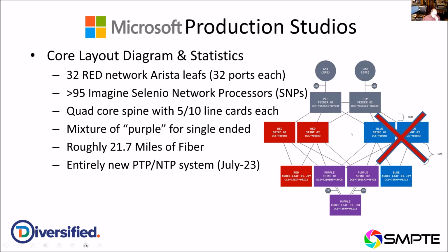Now, the reason for this is quite bold. A lot of the products like this, the Dream Catchers and the EVS and so forth, the new products came with IP cards in them, and the existing products which were going to be upgraded were waiting for IP cards. Despite the fact that we might have been delivered the cards for the interfaces, we literally had only enough time to put Selenio network processors, the SNPs, in as gateways from the SDI router to IP and the IP back to SDI router. And we did this for a couple of reasons.